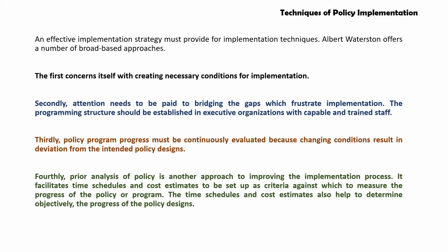Thirdly, policy and program progress must be continuously evaluated because changing conditions result in deviation from the intended policy designs. And fourthly, prior analysis of policy is another approach to improving the implementation process. It facilitates time schedules and cost estimates to be set up as criteria against which to measure the progress of the policy or program. The time schedules and cost estimates also help to determine objectively the progress of the policy designs.